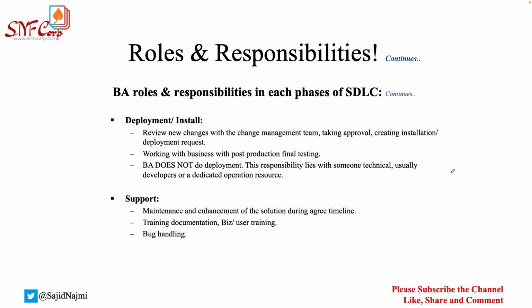Next phase of the software development lifecycle, you have to do deployment and install. Obviously, when you're delivering something, deploying to the business environment, probably as a BA, you will not have that much to do. In most of the cases in traditional waterfall, as a BA, you have to request a new change to the production. There's one environment in the production that end customers are using, and you would not want to deploy something that is breaking any of the existing features or functionality and impacting the end customers and costing a business a lot of money. So to avoid those situations, in most companies, if they are into traditional waterfall, they have some change management processes and team.